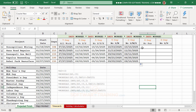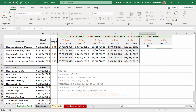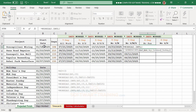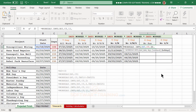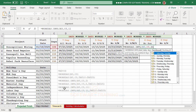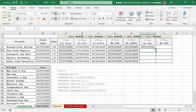The next scenario is a Monday-through-Saturday work week where only Sunday is the weekend day. We use WORKDAY.INTL again: equal sign, WORKDAY.INTL, start date, comma, number of days, comma, and then we enter number 11, which represents Sunday-only as the day off. Press Enter and copy down.